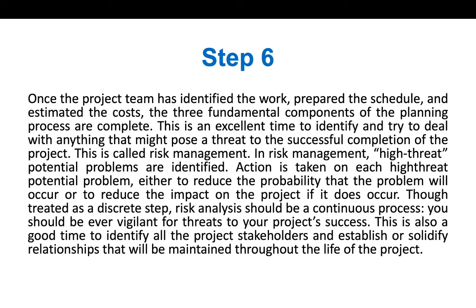And we will say that if the rain happens, we will not do the tower work, we will do some other indoor construction work. But if there is no rain, then we will do the tower work. So this type of risk is that we know it may or may not happen, but we are ready for it. If it happens, we will do this. If it does not happen, we will do this. All these details of risk management we will study in our coming lectures. So the main purpose of step 6 is about risk management.